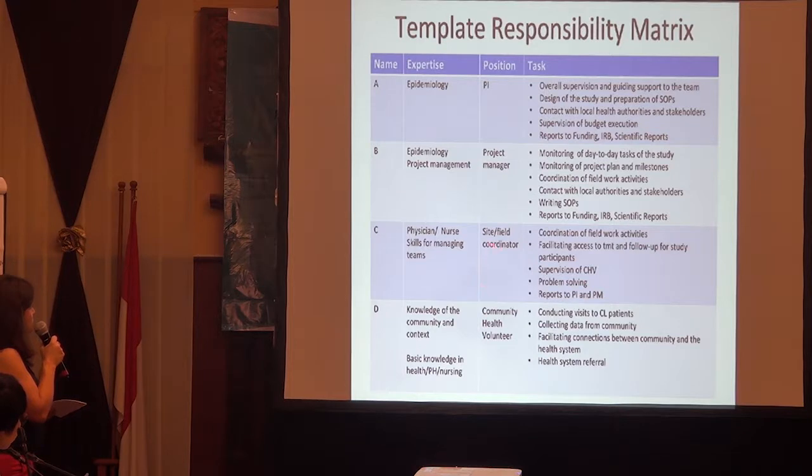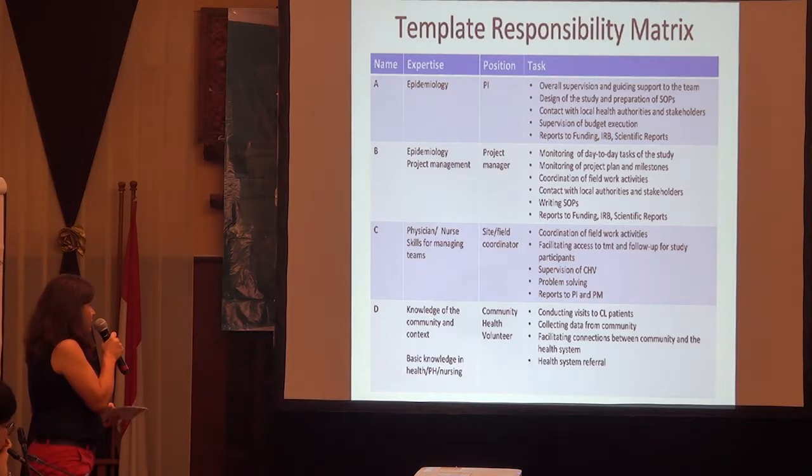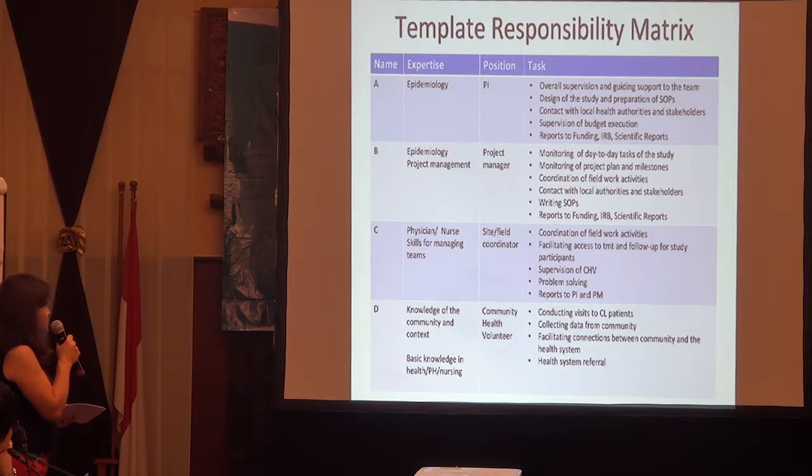So remember, in each site we have a field coordinator. Usually there will be physicians or nurses with skills for managing teams. They are going to be in charge of coordinating the fieldwork activities, facilitating the access to treatment and follow-up for study participants, supervision of the community health volunteers, problem solving in the field, and also reports to the PI and to the project manager.